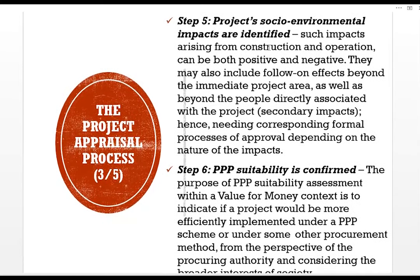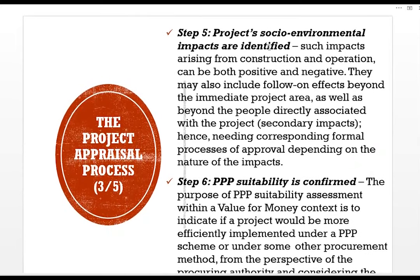Step five: project social and environmental impacts are identified. Such impacts arising from construction and operation can be both positive and negative. They may also include follow-on effects beyond the immediate project area, as well as beyond the people directly associated with the project — that is, secondary impacts — hence needing corresponding formal processes of approval depending on the nature of the impact.